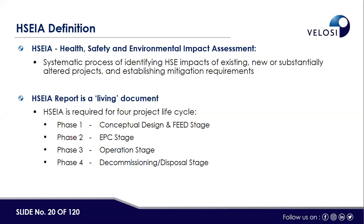The project phases start from Phase 1, which is the concept or FEED stage; then Phase 2, the EPC phase; Phase 3, the operation phase; and Phase 4, the decommissioning and disposal stage. There are also combined-phase projects that require HSEIA covering all aspects. In general, the four project phases include conceptual design, EPC, operation, and decommissioning/disposal respectively.